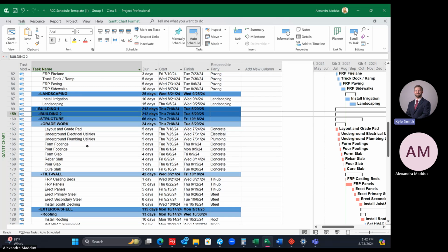You can see a little arrow, the one that goes left, with three lines and an arrow right next to it. So if yours pasted like this, where the second building's underneath another, click on it, and then in the task ribbon, this is the outdent and indent. Outdent it, and then now you're good.